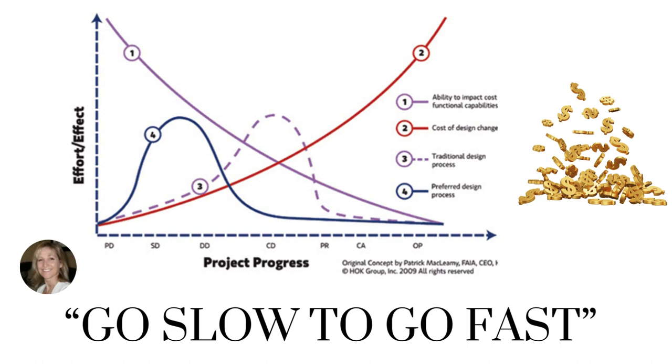2. Design development phase. Moderate cost of changes. As the design progresses into the design development phase, the cost of making changes starts to increase. More details and specifications have been established, making alterations more involved and costly. However, it is still more economical to address these changes during this phase compared to later stages. 3. Construction phase. High cost of changes. Once the construction has started, making changes becomes substantially more expensive. Changes at this stage often require rework, may cause delays, and impact various aspects of the project, leading to increased costs and potential disruptions.